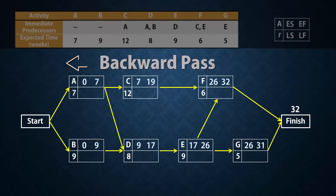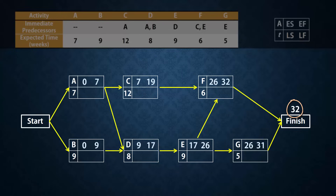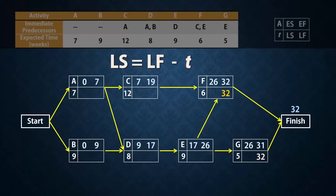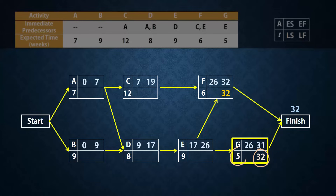Now let's do the backward pass. Since the project's completion time is 32 weeks, the latest finish times for the activities at the finish node, F and G, has to be 32. That is, F and G cannot be completed in longer than 32 weeks. Next, we obtain the latest start times by subtracting the activity times from the latest finish times. For G, the latest start time will be 32 minus 5, to give 27. For F, the latest start time will be 32 minus 6, and that gives 26.